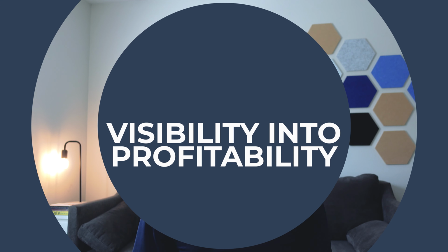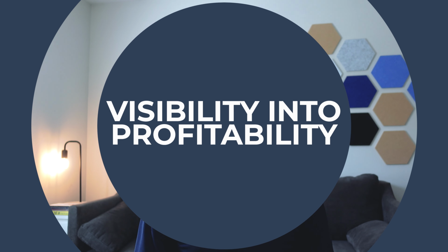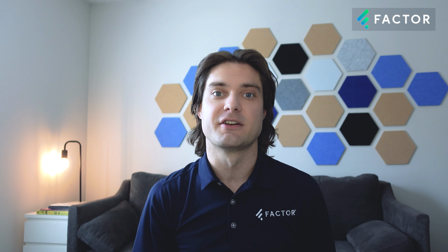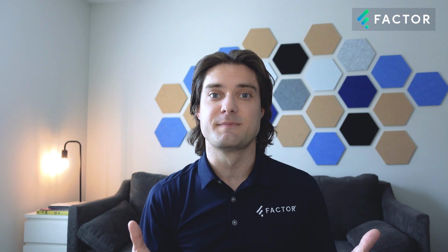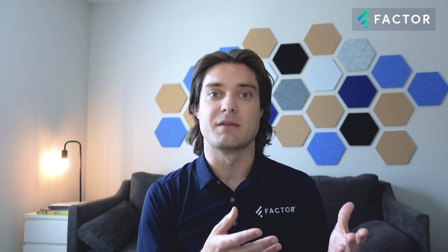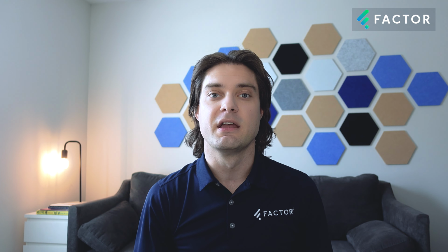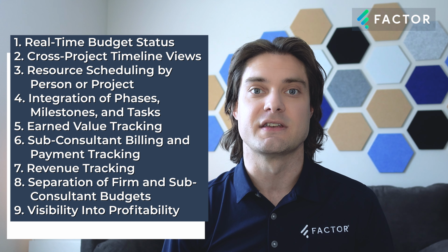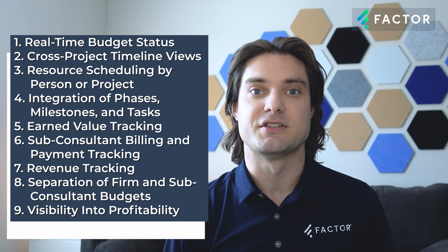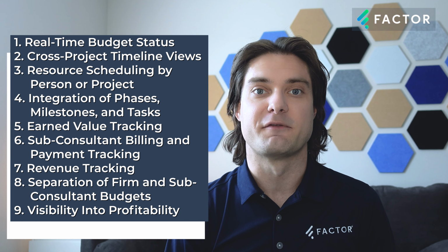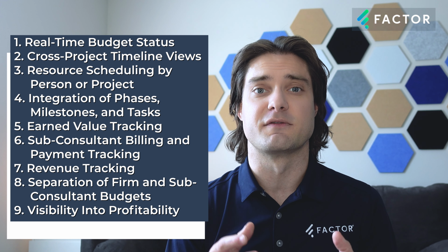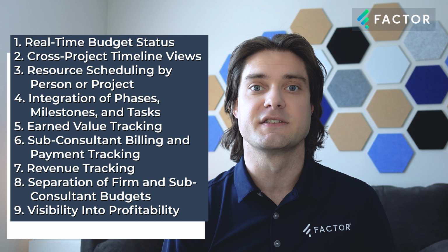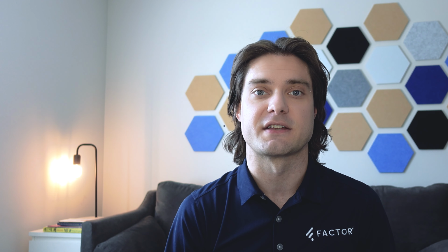Number nine, profitability. Any good system should be tracking in real time the cost of your employees as they're logging their time and the revenue that's generated, and across your expenses, the cost and what can be invoiced to the client with any markup. That way, as you're earning revenue and then invoicing the clients, you can compare that to the cost on the project and see real time what your profitability is, not just in terms of the overall project, but in terms of services versus planned expenses on the project.